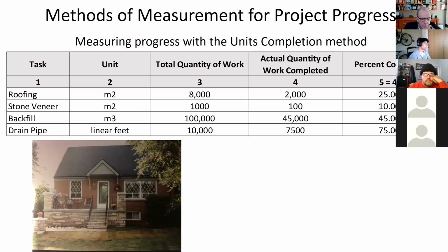And so you'd be able to look at it that way. But what I was trying to say too is it doesn't always represent exactly time. Like this is a very small project. So this one would actually lend itself well to how many days you figured it would take to do it and how far along are you on it, as you'll see in one of the other methods.